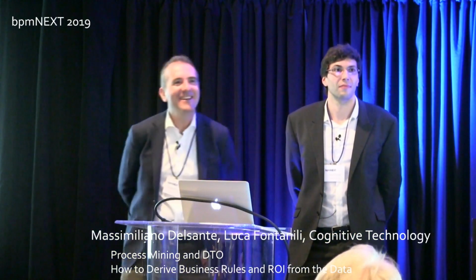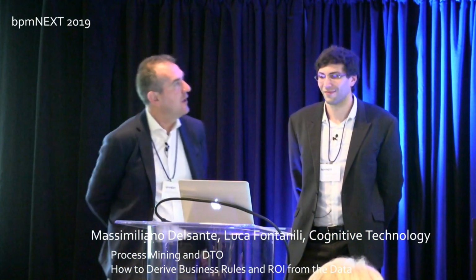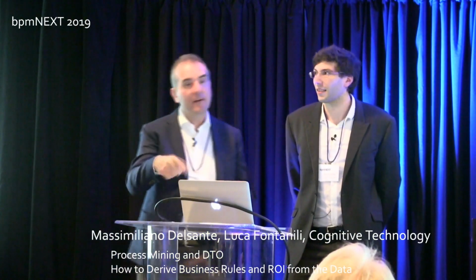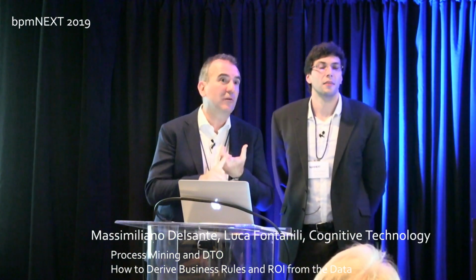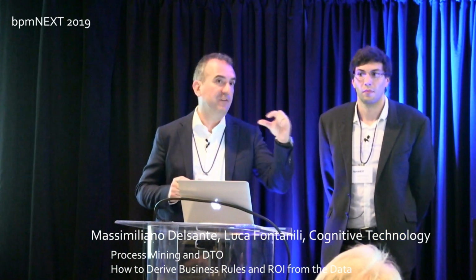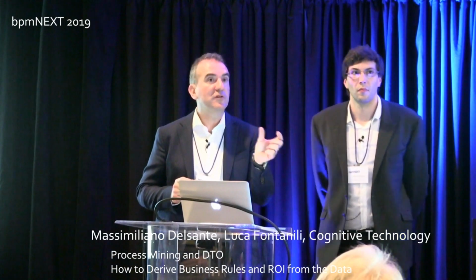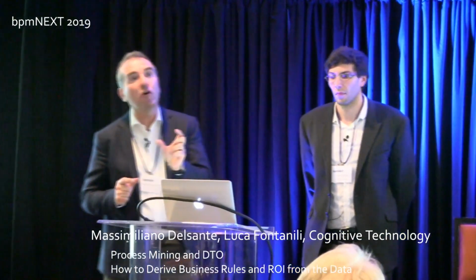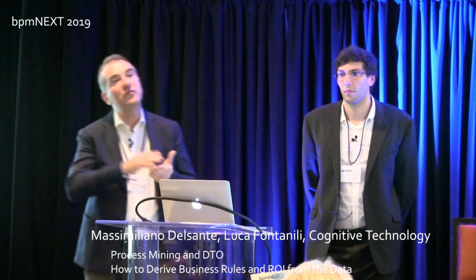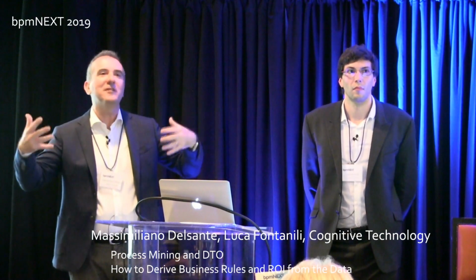How did you capture cost? Cost is input information. You can provide the cost related to activities, resources, and roles. Activities have a fixed cost, while the cost related to resources and roles is tightly coupled to the working time. These are input information that we then use in all the different variants in order to identify the difference in cost when you follow the different paths.